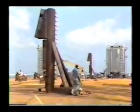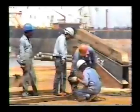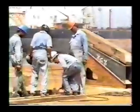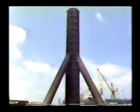Day and night, 24 hours a day, the work continues. The preparation of the deck takes 6 days and is carefully controlled by Weissmuller experts. Steel guideposts are welded into position, ready to line up the cargo during loading. All in all, a very thirsty job.